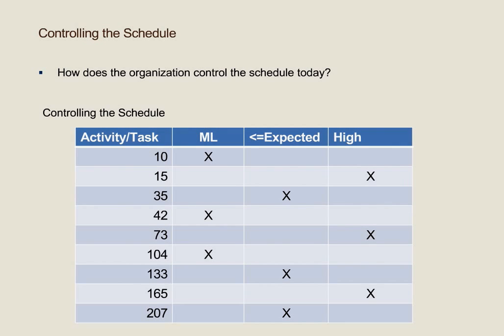Every project manager wants to understand and control their schedule well. A schedule that is based upon good estimates is fundamentally easy to understand. If I understand it better, then I can control it more easily. The table on this slide shows a reasonably easy control tool that can be used if the estimates were developed using the three-point technique shown on a prior slide. All it requires is rows, columns, and check marks.